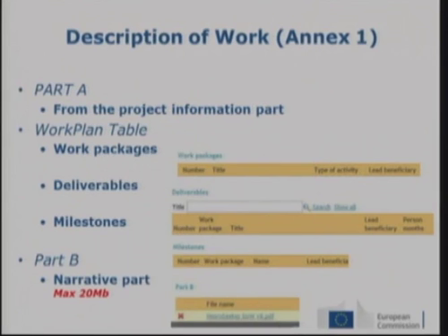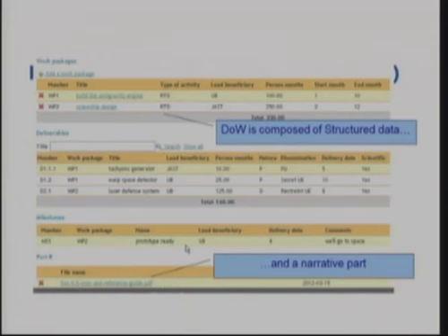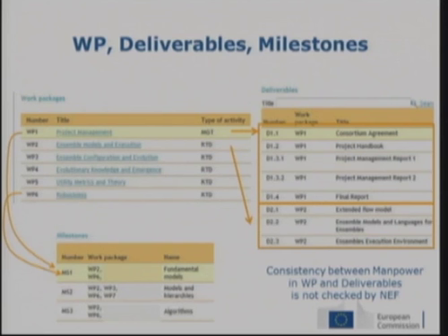Then this information, once signed, will arrive to the coordinators, and they will be able to reject these financial statements, and they will go back to the beneficiary. They will have to do the same process again. Or you approve, also in the system, and these financial statements and the certificates will be submitted. Then in the Commission, we will have an electronic receipt for each Form C, and one with the consolidated receipts, Form Cs. What will you be able to see?